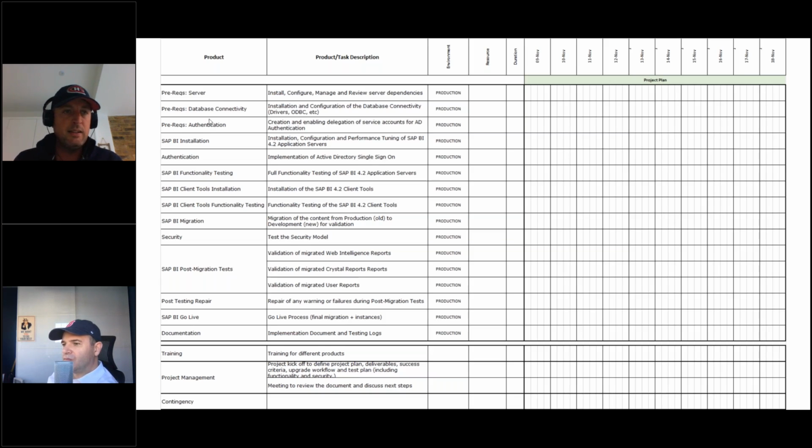But yes, there'll be some people doing the prerequisites, and maybe it's not the same resource doing these three things. And somebody will say, I need 2 months to give you a new server. I hope not these days, but it's possible, right? Well, here we go. It means that the first 2 months are gone. So you can't install, you can't do this, you can't do that.